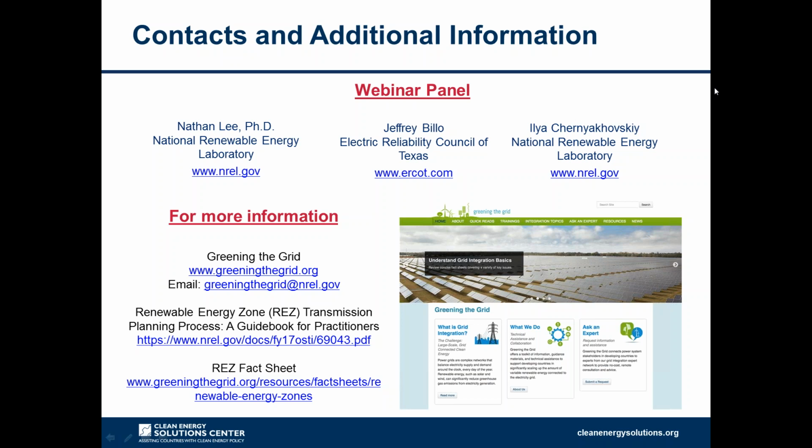The decision makers in Texas were all aligned between the legislature and the Public Utility Commission. I think everyone was aligned in the goals that we were trying to achieve. My understanding, from talking to colleagues around other parts of the United States anyway, is that they have maybe started some similar initiatives, but they don't have all of their decision makers aligned. And part of that is due to the fact that in other parts of the country, the transmission facilities would have to cross multiple states, and it's hard to get all of the decision makers and all of the states to be in agreement on what the goal is that they're trying to achieve.